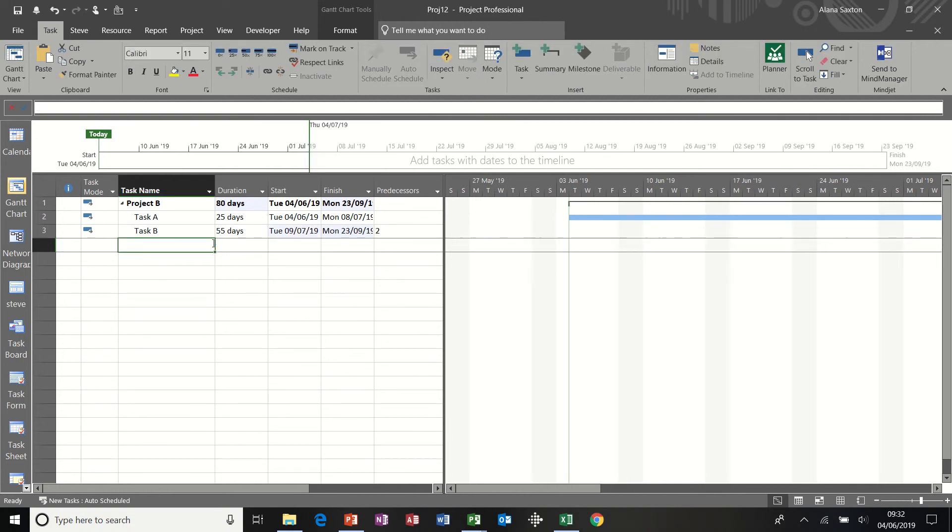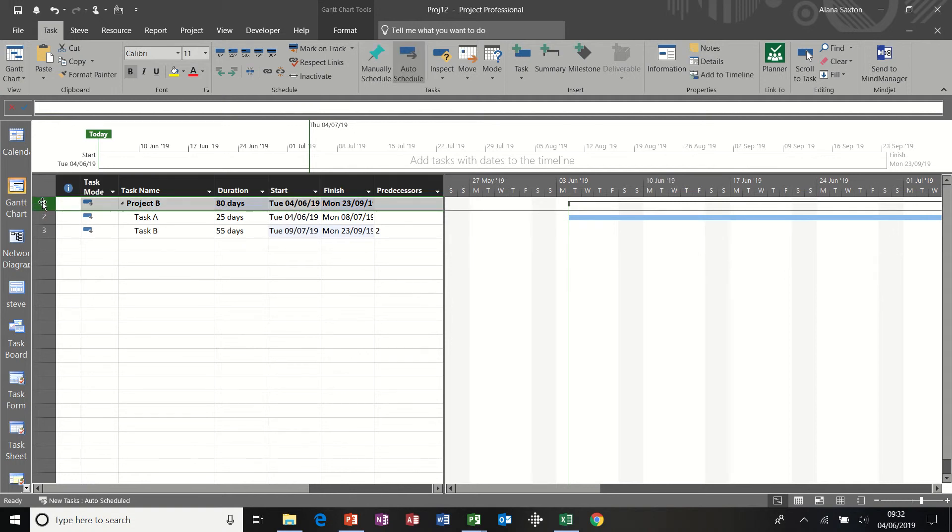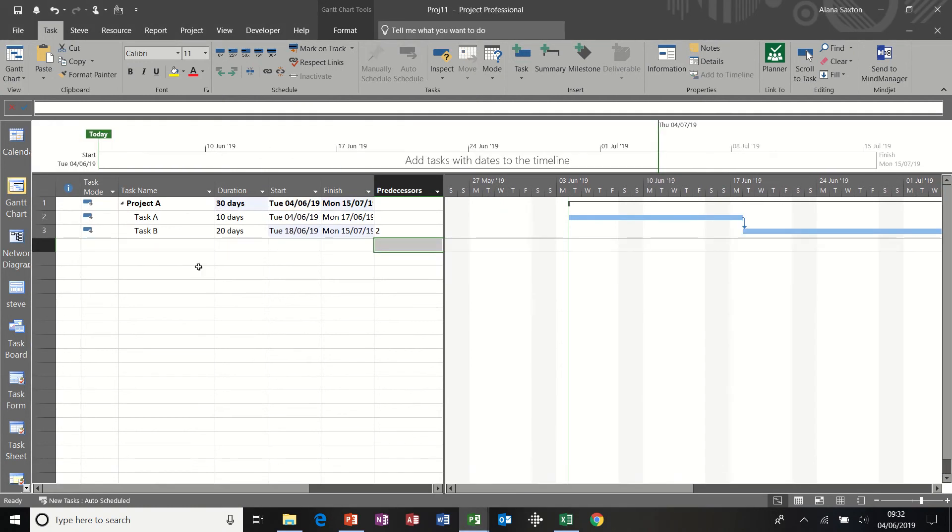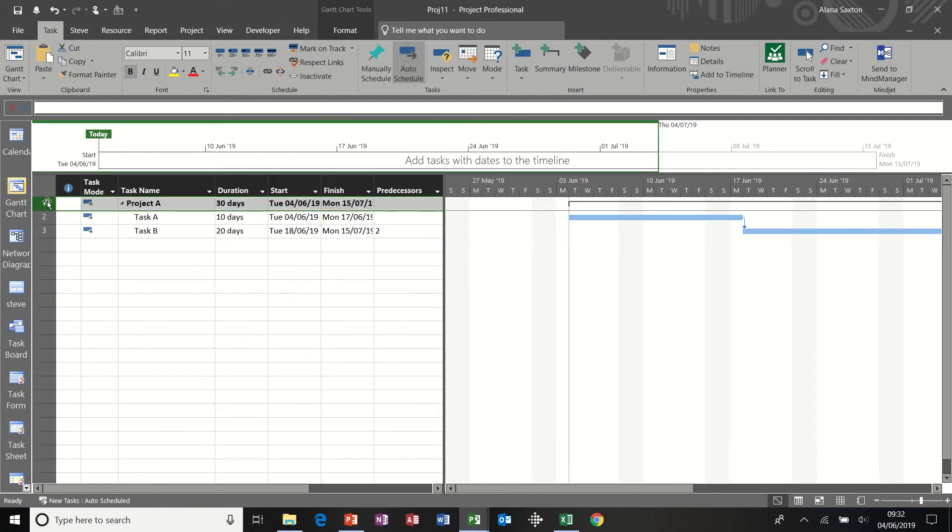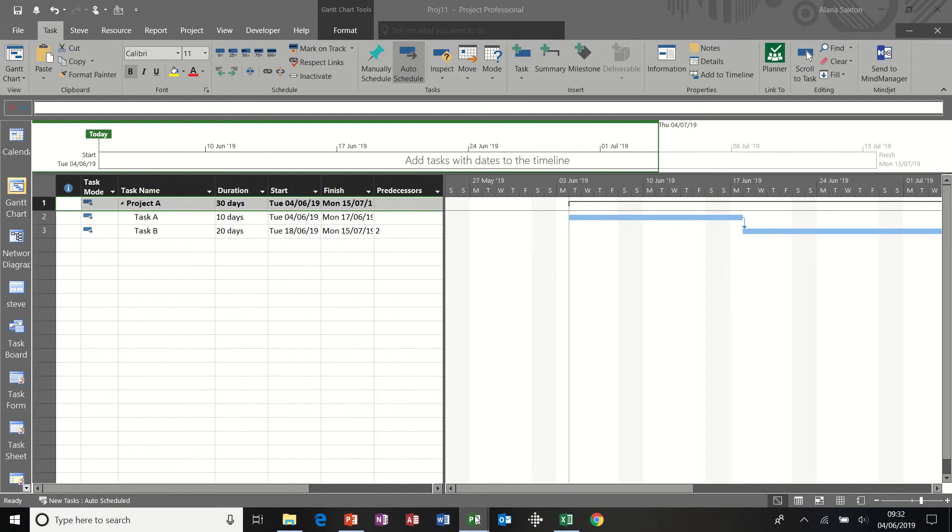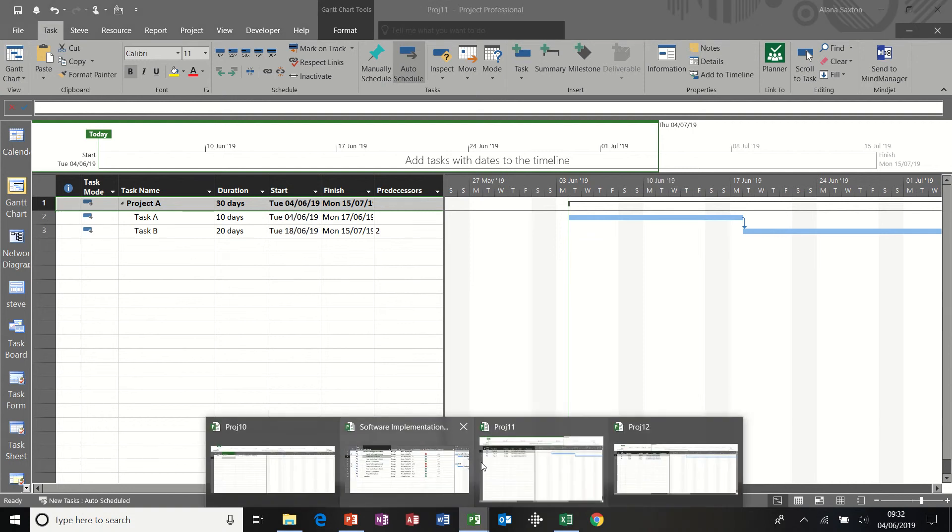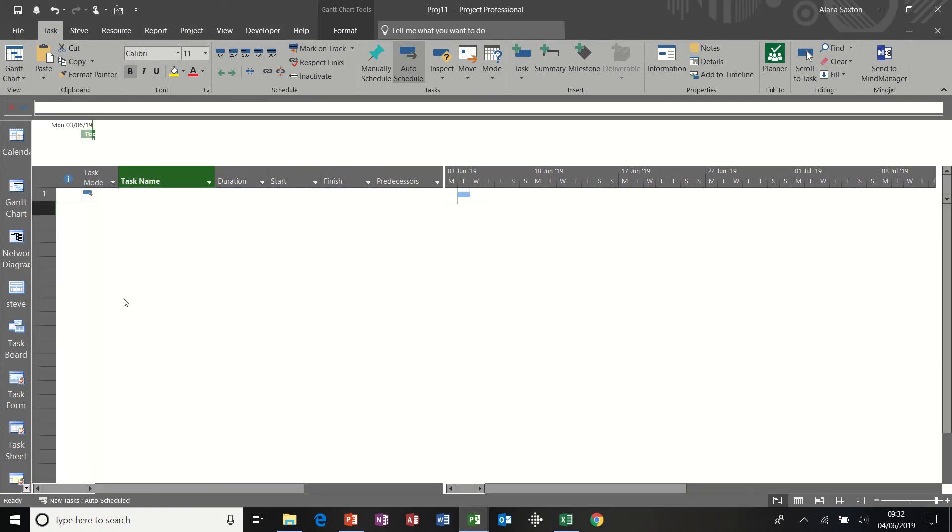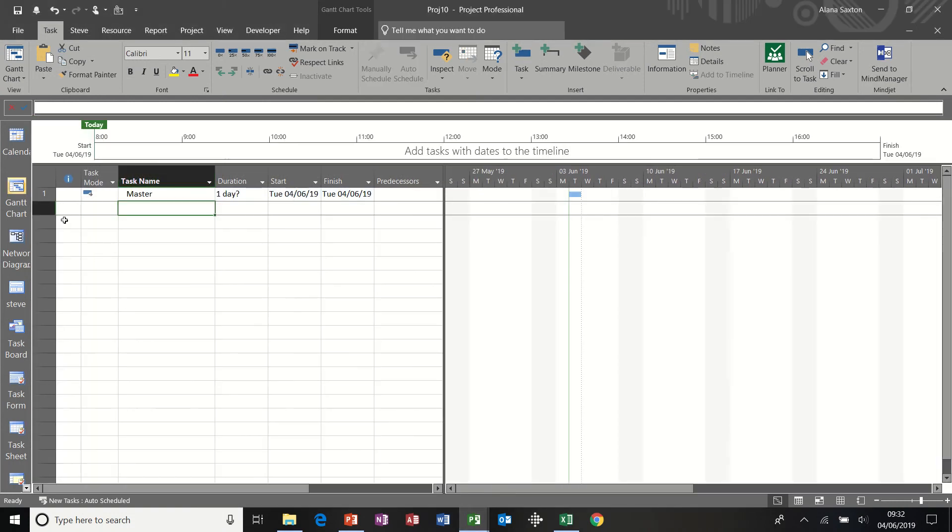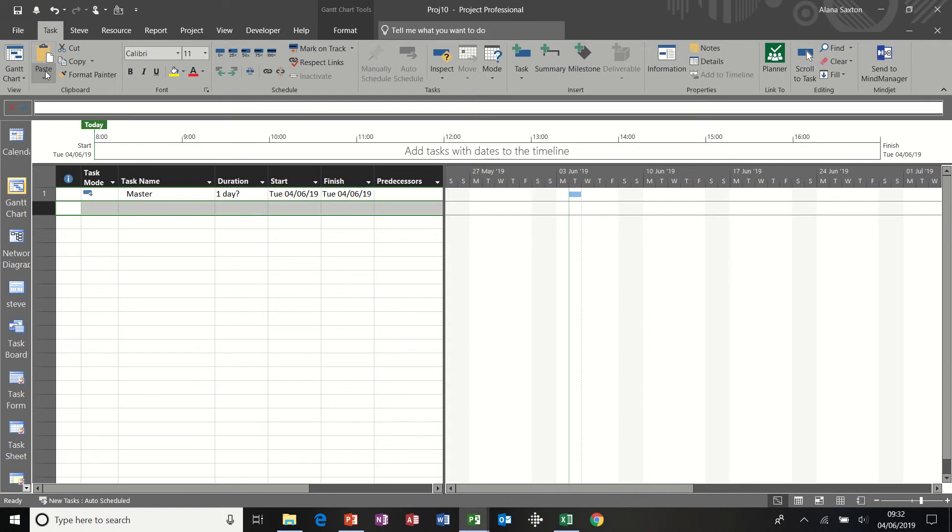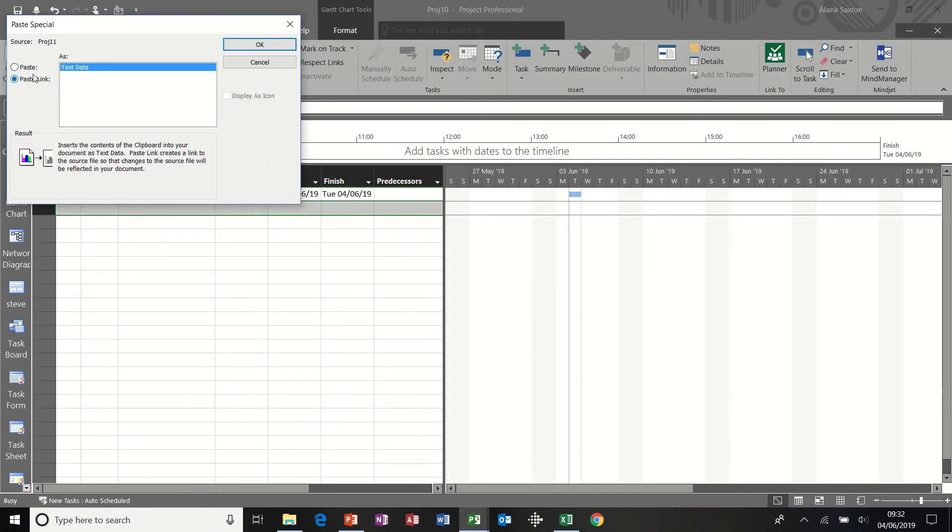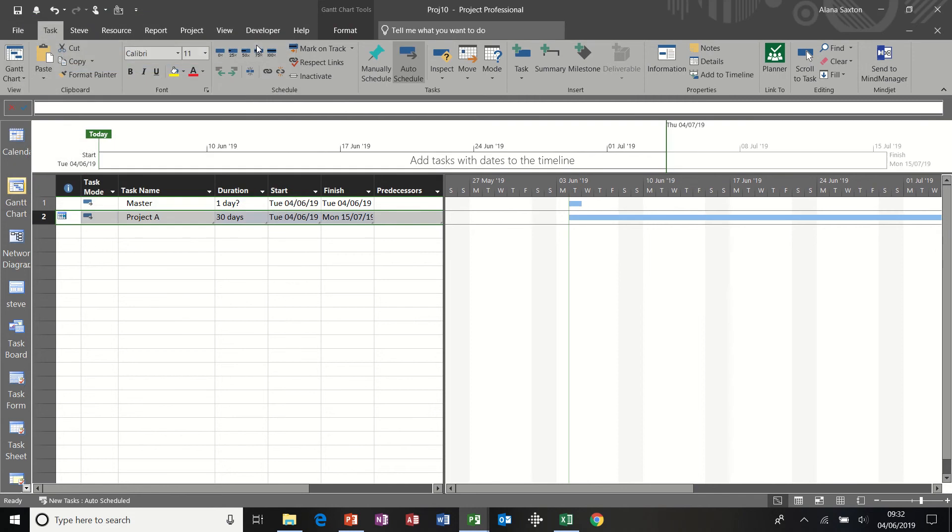Now I want to bring the summary tasks into the master file. So highlighting the top one. In fact, I'll do Project A first. So it's in order. Project A. Highlight. Copy. Go back to the master file down the bottom there. Highlight the row. Paste. Paste Special. Paste Link. Remember that's the key part. OK.